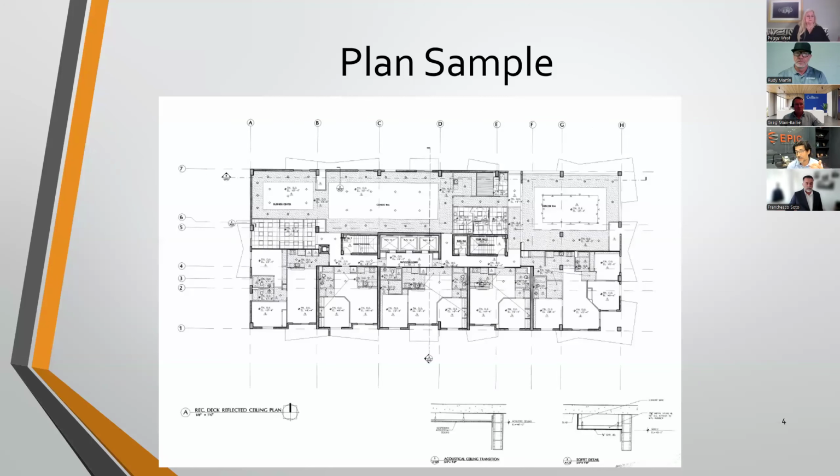You'll get a lot of consultation from your professionals on the front end, meaning your engineer and your owner's rep, at least for the nuts and bolts right there. You'll have a list of your apples, your oranges, and your bananas, and the base cost of all those ingredients, which is the project. Let's use $100,000. Everybody's coming in at 100, 105, 110, 95. So we know we're on the right track. We know we got a good set of plans. Everybody kind of understands it.